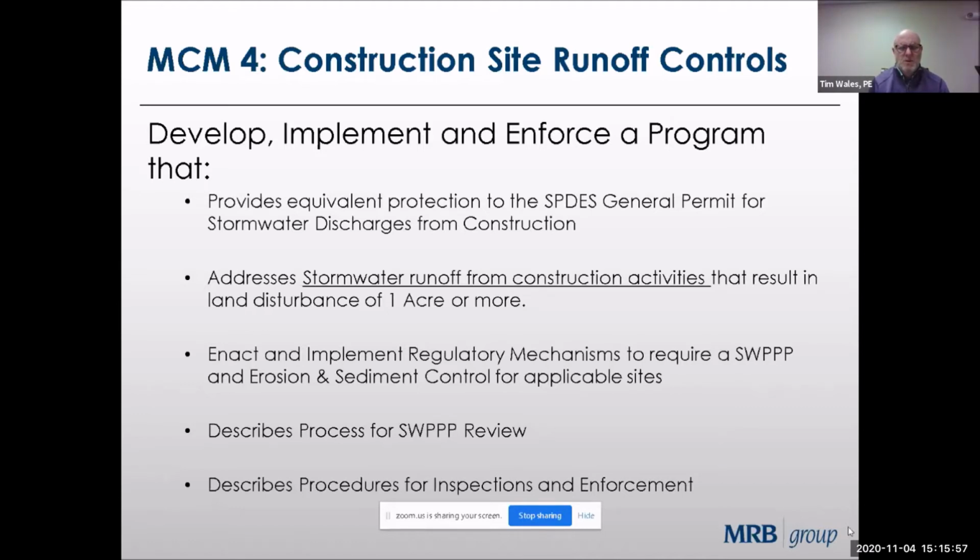That's kind of unusual. Saratoga Springs is a larger municipality. Many of the towns and villages around would not have such a local law. It's also important to note that over 5 acres, residential projects apply if they are 5 acres or more for a full SWPPP. And we'll talk about that a little bit.